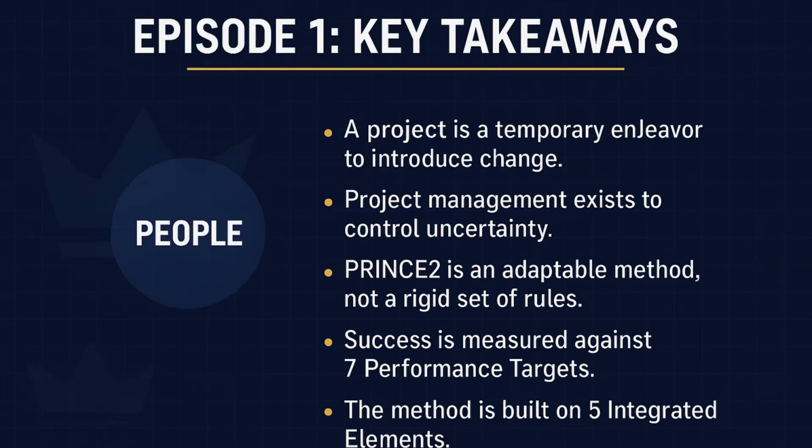Absolutely. It ties directly back to the initiating a project, IP, process. Stage 1 for this project would likely be very focused on thoroughly completing the IP activities, creating a solid PID, developing a clear business case, defining roles very explicitly before any significant campaign execution work begins. So whereas the data knowledge project might have done a lighter IP, now buy-in needs a heavier, more thorough IP to compensate for the low maturity.